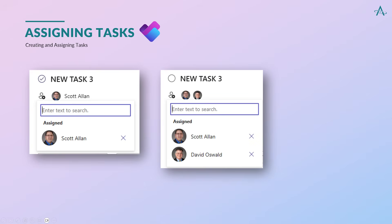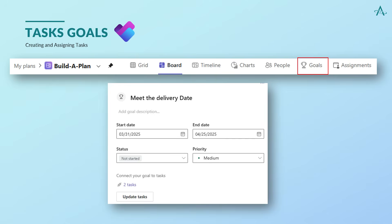Once tasks are assigned, resources can be notified via Outlook Tasks. Planner Premium includes a dedicated goals tab where you can define key objectives, like meeting a delivery date. You can connect those goals directly to tasks in your plan, set start and end dates, assign a priority, and track the status of each goal. Then link any related tasks so you can see how the work supports the outcome.